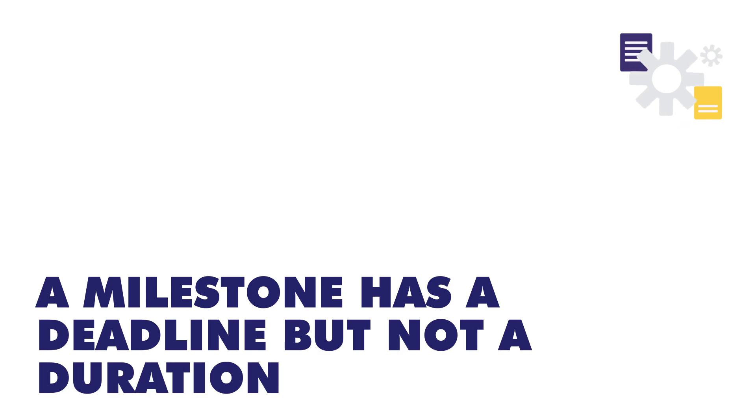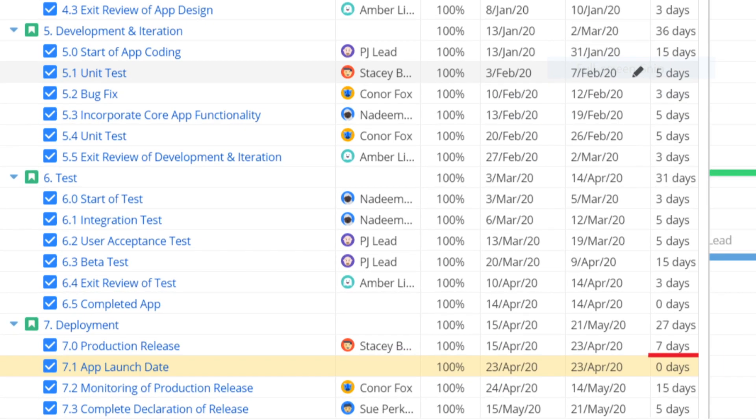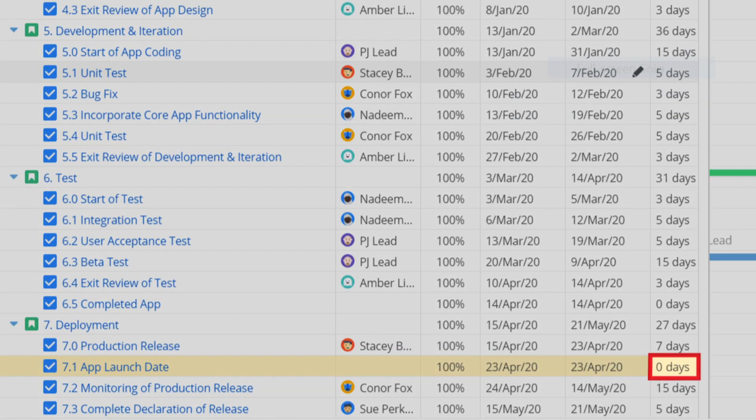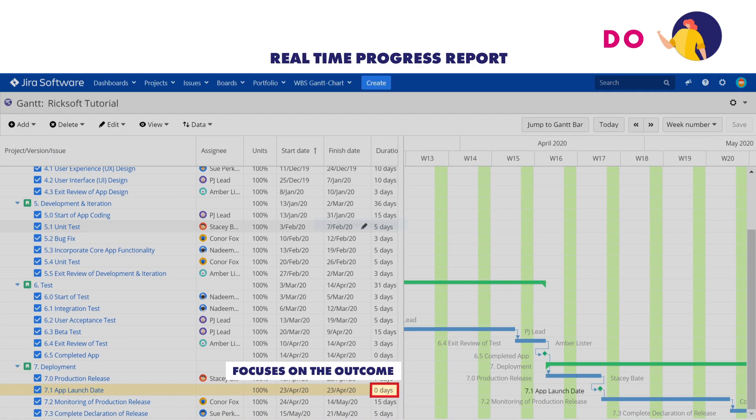Secondly, a milestone has a deadline but not a duration. It's a real-time progress report that marks crucial points in your project's progress. Zero milestone duration also means that it focuses on the outcome of the task completion rather than the process.